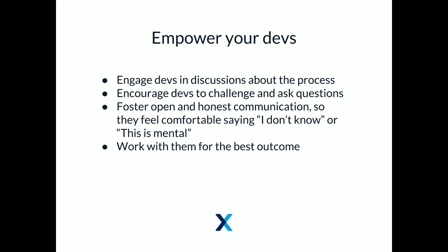The question was whether we engage with a single developer or go to the team. It depends. If it's a project like a sprint that's actively happening, we do team estimates. But if it's a retainer or a mini project, I'll just pick the developer who I think knows most about it, and who will probably also implement it, because that's another thing I'll mention later. But it just depends on the situation.